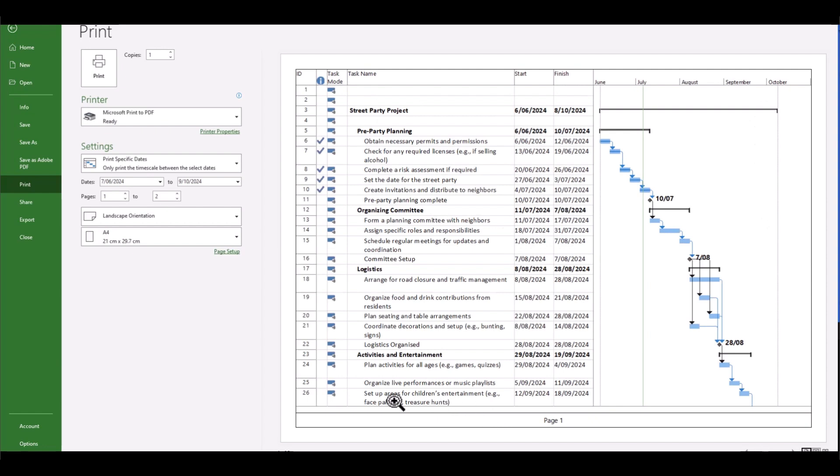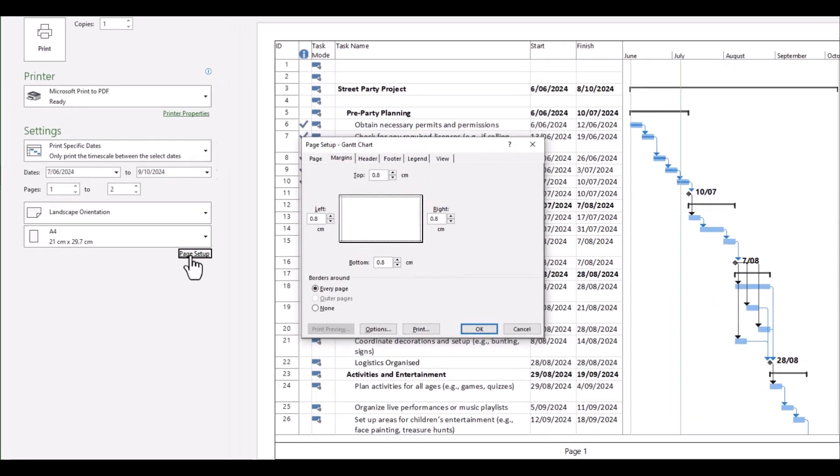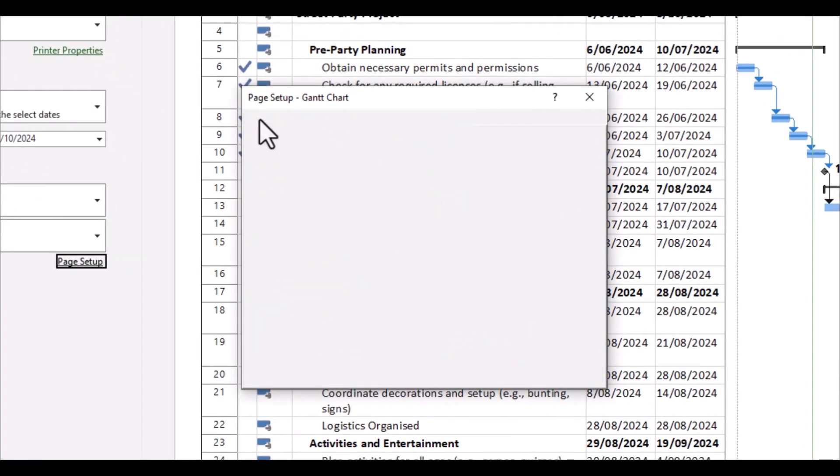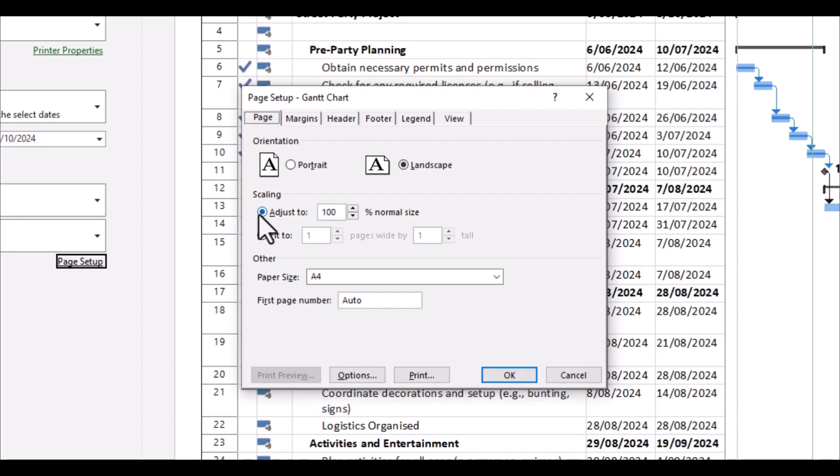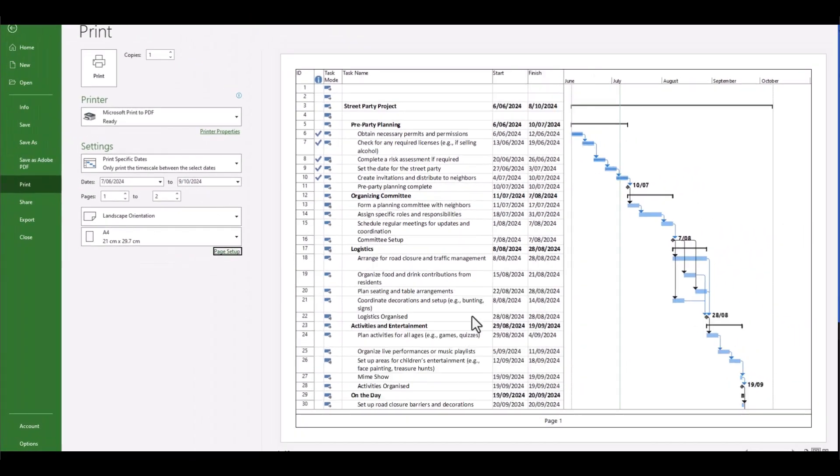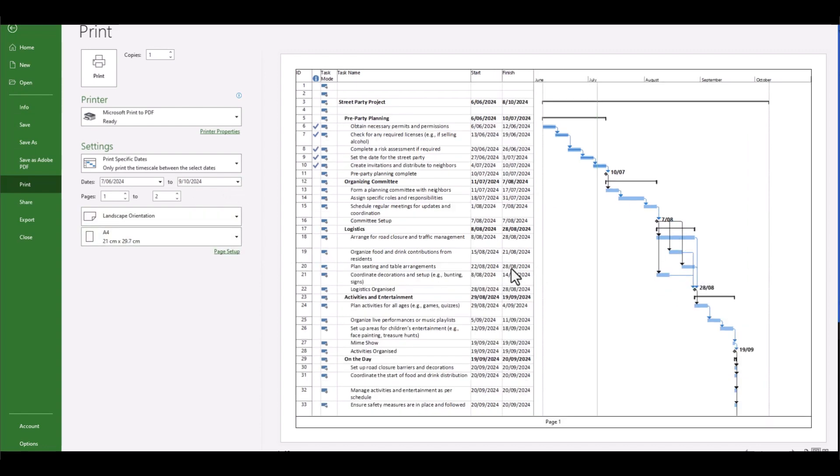Well, there is one more trick that we'll utilize today and that is in our page setup. We click on the page tab and you'll notice there's scaling. Scale to 100%. Once again, this can be a little bit of trial and error. So let's reduce this down to say 90 and see what we're left with. Getting a bit more of our Gantt chart back. Let's maybe move it down to 80% and see how we go. So you'll notice that after doing this, we are getting much, much closer.